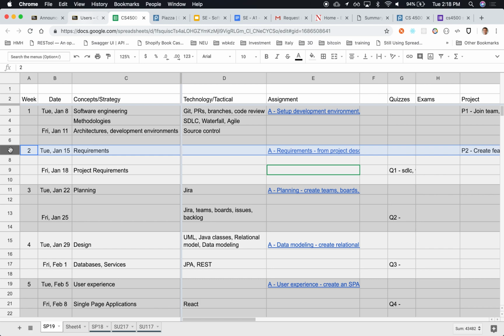Right? We'll say, okay, we'll create a project, we'll create a team. These are the members of the team. We'll start creating all sorts of things that need to be done. It's a glorified to-do list. Jira is a glorified to-do list. These are all the things that need to be done, right? And now we're going to start feeding all the things in a particular sequence of what gets done first, and we'll keep track of the status of each one of the tasks. Who's assigned? Who has this particular task assigned?